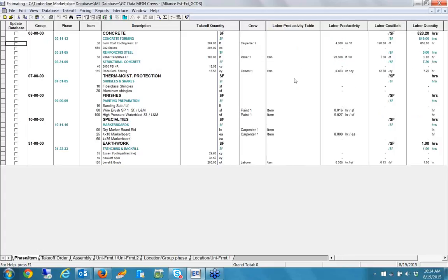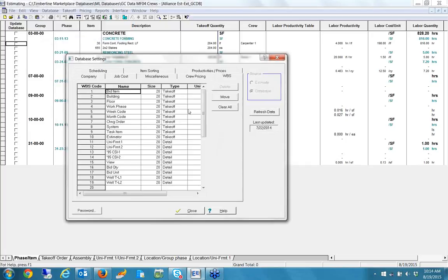The next major difference is that in standard you have what they call a WBS code, which stands for Work Breakdown Structure Code, and you get one. In extended you actually get a library of 40 that you can build. When I say 40, there's 40 codes that you can build in the library, and within each one you have an infinite number of entries, such as CSI code level 1. There might be a whole list of CSI trades. I'm only using one WBS code. But the beauty here is the WBS codes give me several main things.